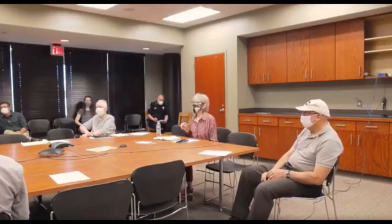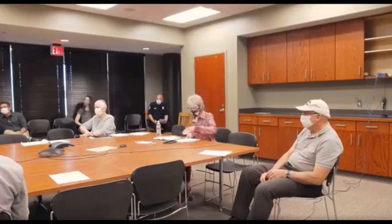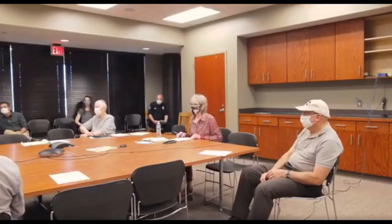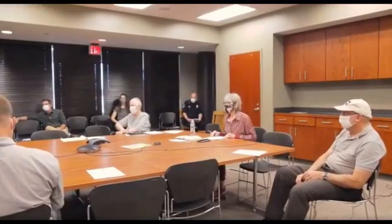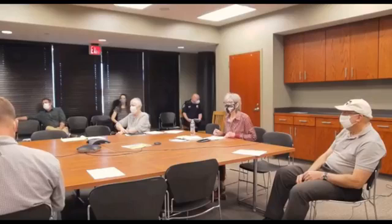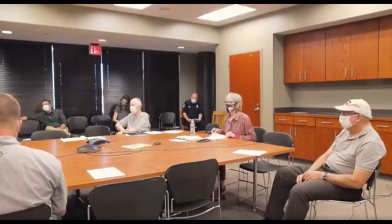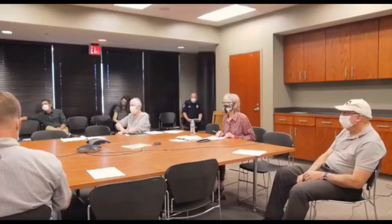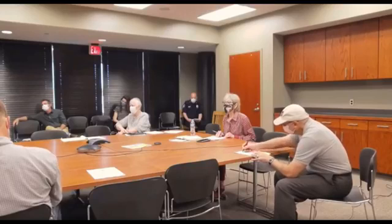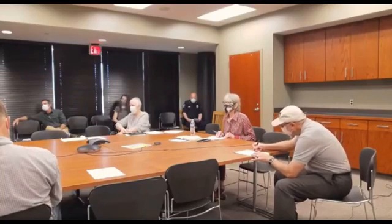Okay. All right. Then in that case, unless I say one thing that I didn't. Sure. If we move forward and through things like Green Oaks and everywhere else, this I think is probably as good a time to get construction started as we're going to have in a while. We would envision that combination of our warehouse. We would hope to have that completed within about a year. So if things go well, depending on how the bids come back and everything, we're teeing it up to maybe look for a May, June of next year time frame. But that's kind of what we built into our budget.